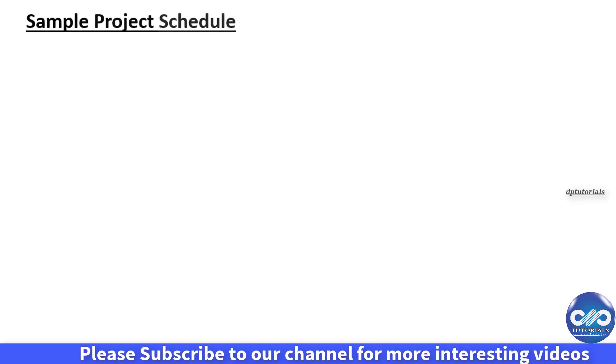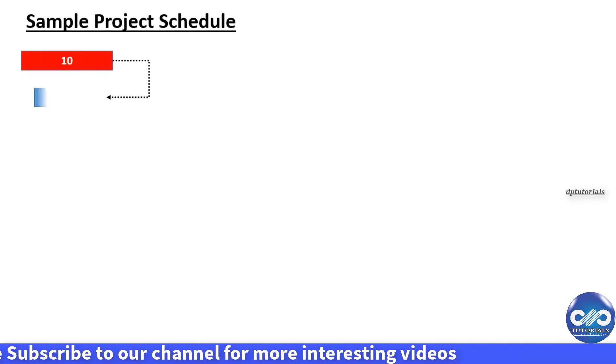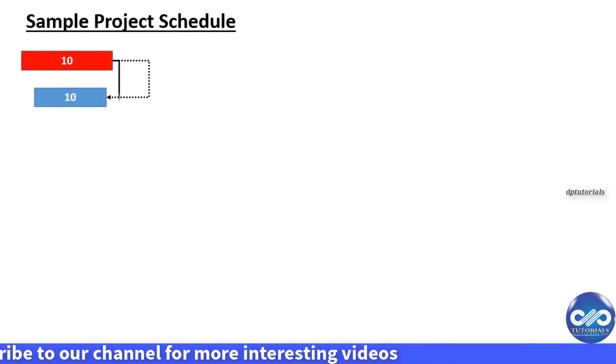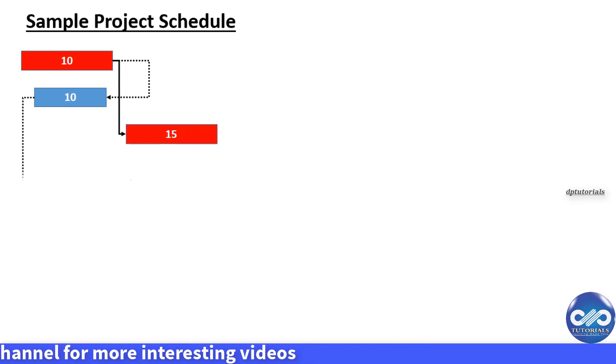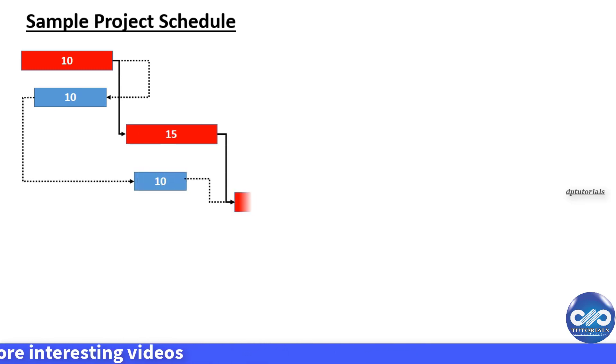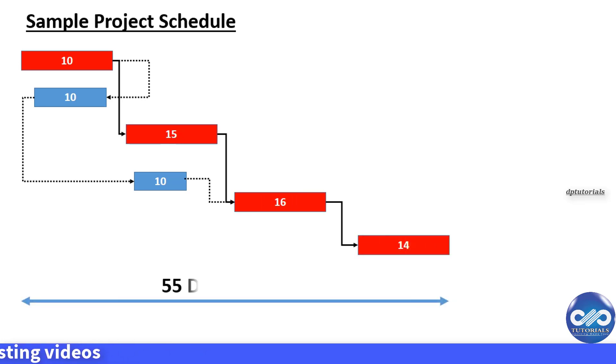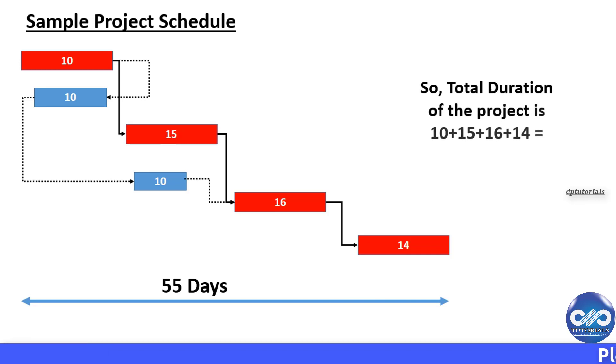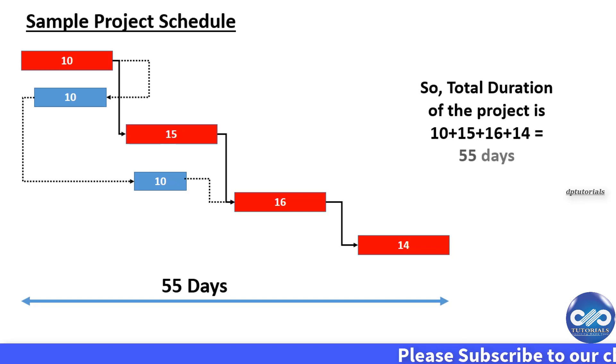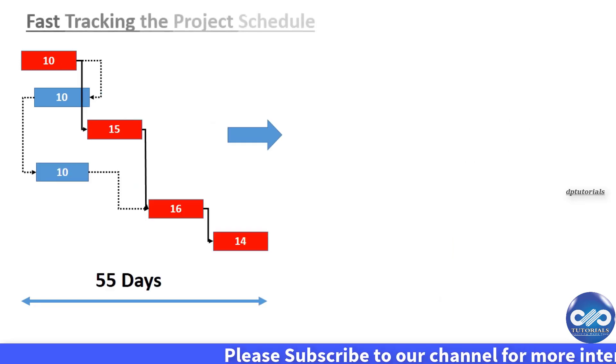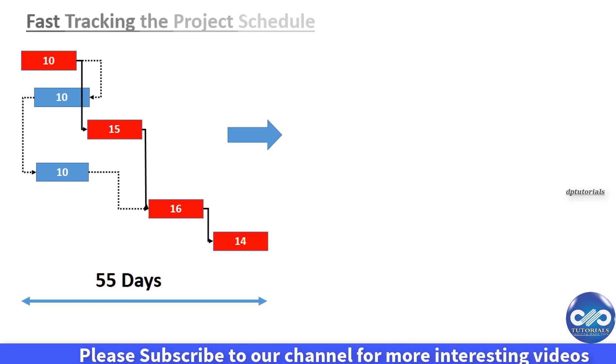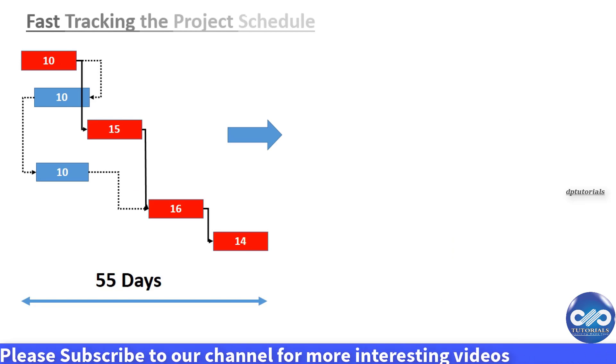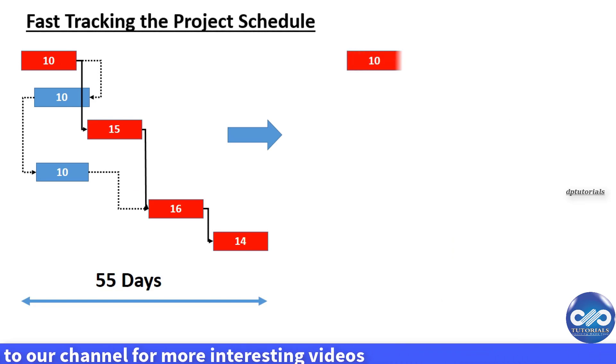Let's see a sample schedule now. So here the project duration is of 55 days. Now let's see fast tracking. Doing critical activities in parallel thereby reducing the project duration is called as fast tracking.